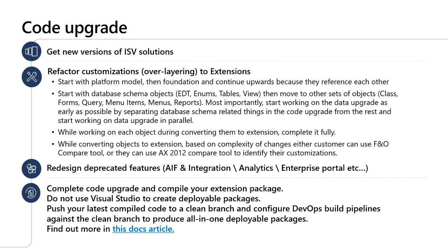Developers need to refactor customizations from overlays into extensions. Recommended approaches: start with platform models, then foundation, and continue upwards because they reference each other. Start with database schema objects like EDTs, enums, tables, and views, then move to other objects: classes, forms, queries, menu items, menus, and reports. Most importantly, start working on the data upgrade as early as possible by separating database schema-related code upgrade items and working on data upgrade in parallel. Complete each object fully when converting. Use the FNO compare tool or the AX 2012 compare tool to identify customizations based on complexity. Redesign deprecated features such as AIF integrations, analytics, and Enterprise Portal — these take time to design and implement, so starting early helps.